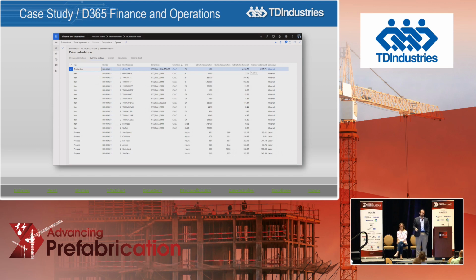And we're also storing the tasks. We're storing the tasks because this is where the shop partners will log their time as that package comes through their station. They'll go to that package in F&O and log their time directly against that package. So we know exactly how much time was spent manufacturing that particular item at that particular station. And again, it all rolls up into how much.